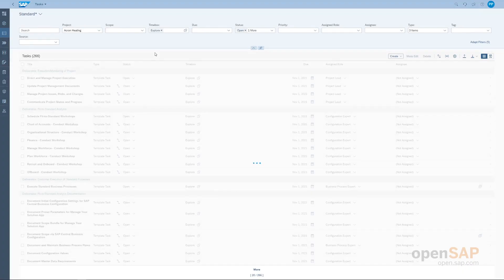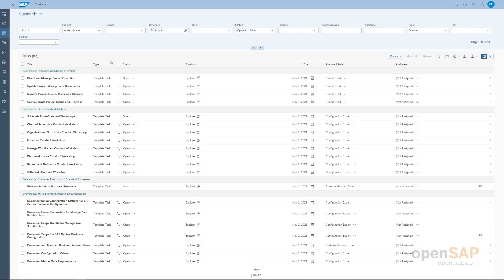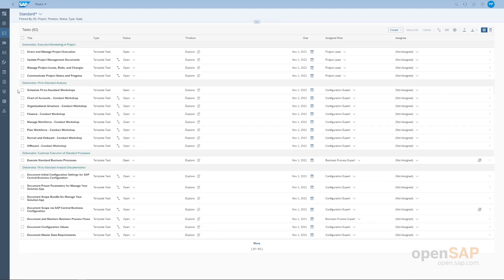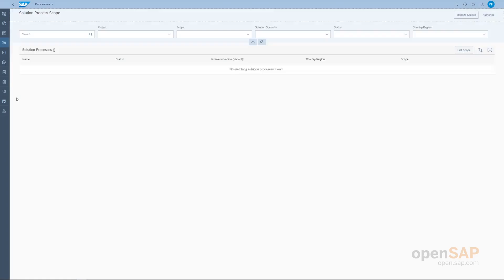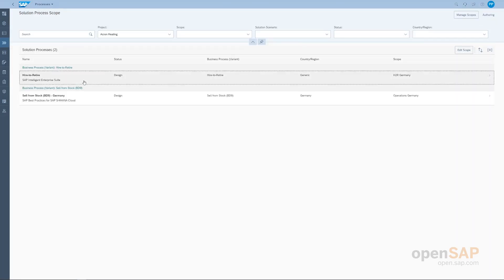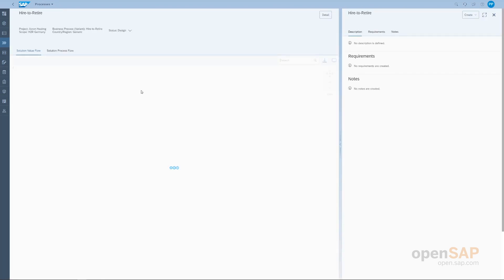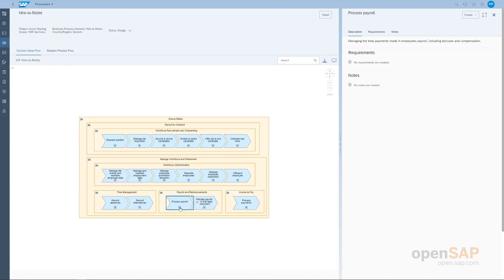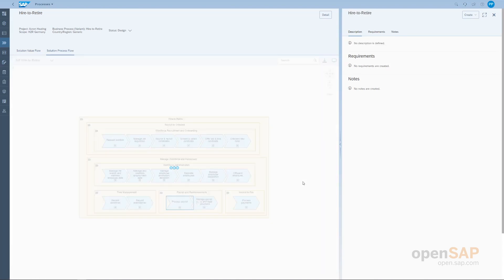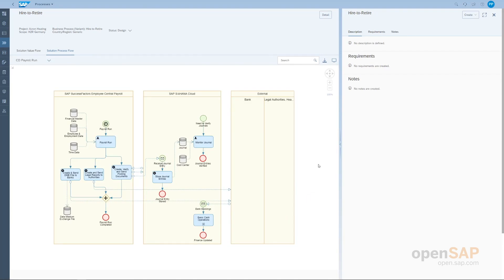Filtering to the explore phase, we now have only 62 tasks. You'll notice an icon beside some tasks indicating there are predecessors — for instance, we should complete the direct and manage project execution task before the update project management documents task. The task we're most concerned with now is conducting the fit-to-standard workshops. We can mark this task as in progress. We would execute the fit-to-standard workshop in the processes tile, where we have our scopes.